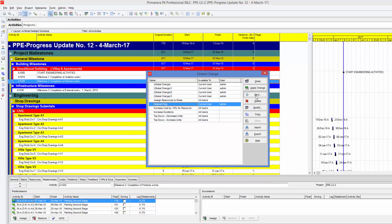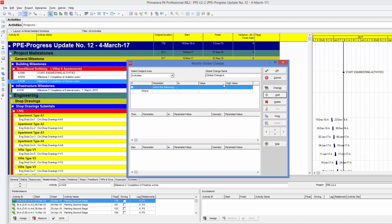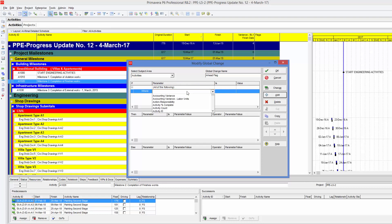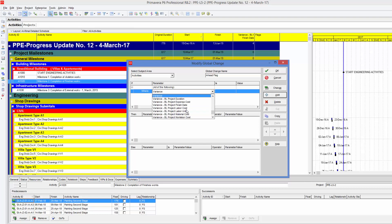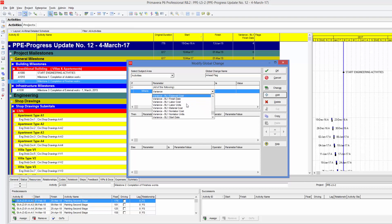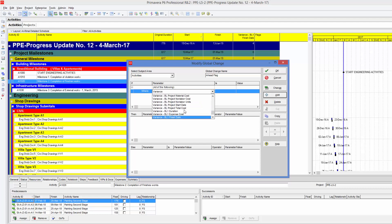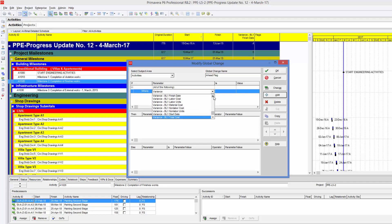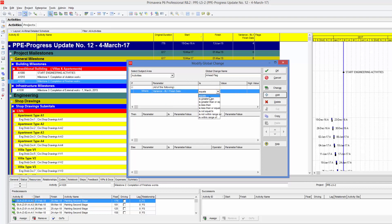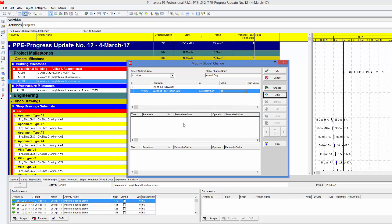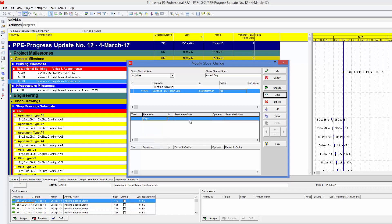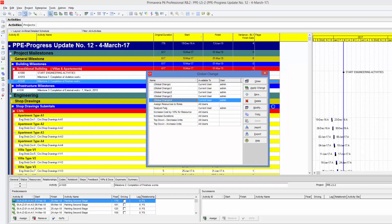And I will create a new one for the ahead activities, and I'll call it ahead flag, just to find this global change later on. Here's the same. I'll find the baseline. Variance baseline 1 finish date. It should be somewhere here. Yes, here it is. And in that case, I'll make it greater than 0. Also, here the condition. I will add the flag column. Should show me a green status. And I'll click OK.